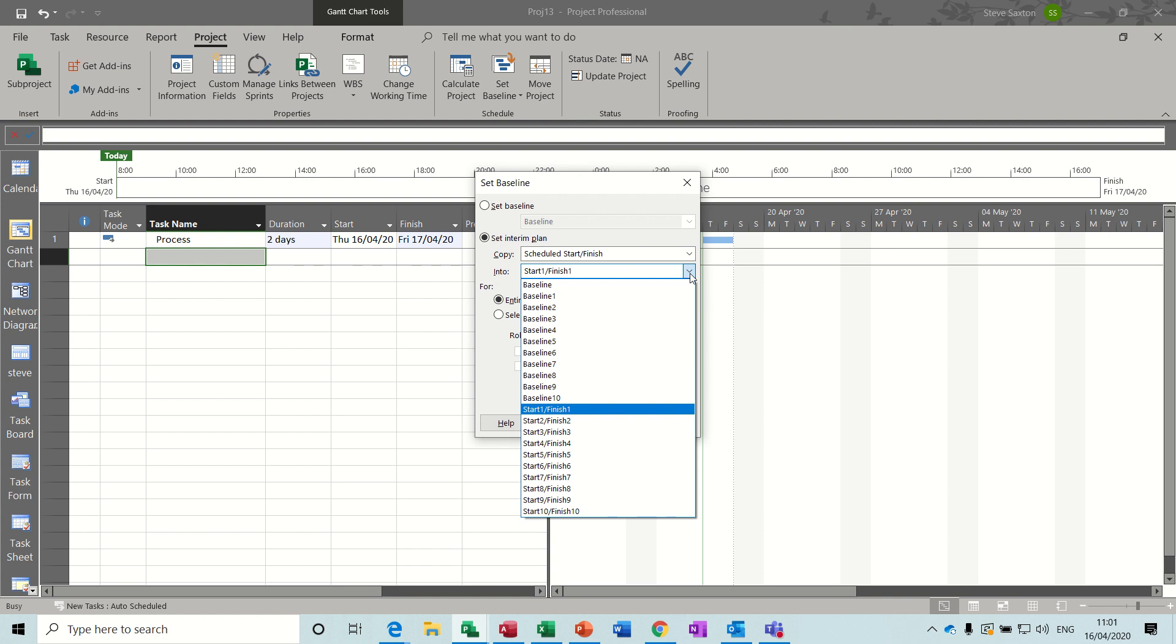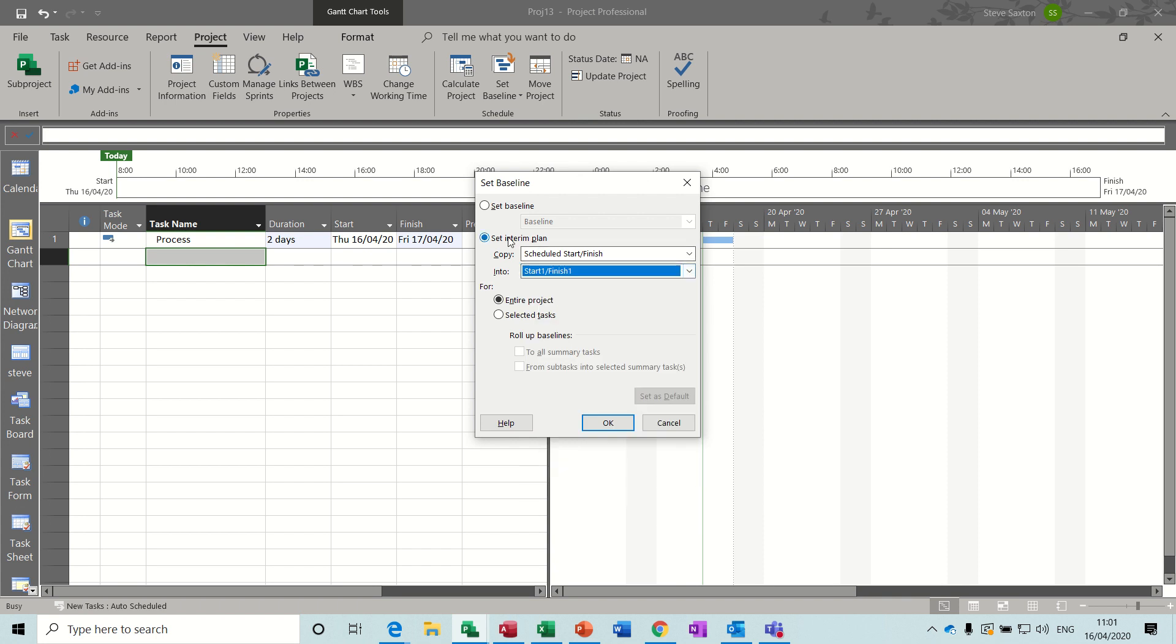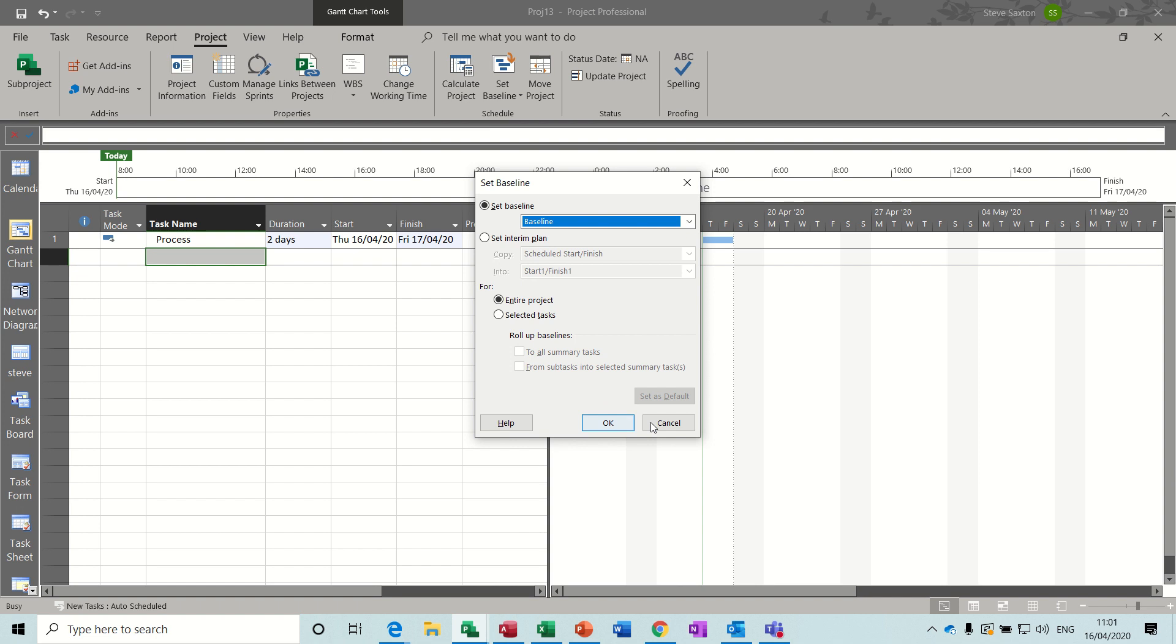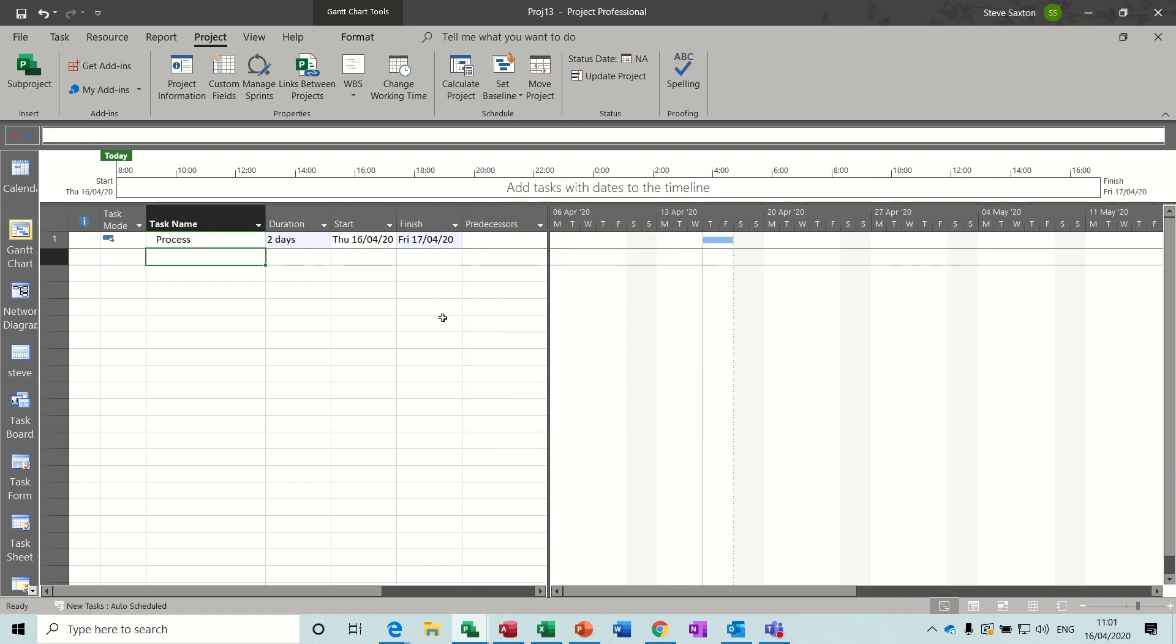If you've been using this you can't do what I'm about to show you. These are quite old now, most people just save baselines and use these, but just be careful because if there's information in these fields you're going to overwrite that information.